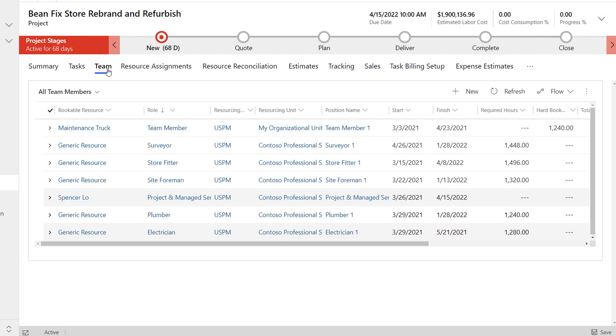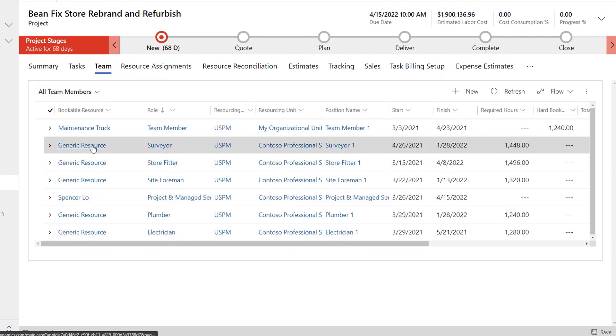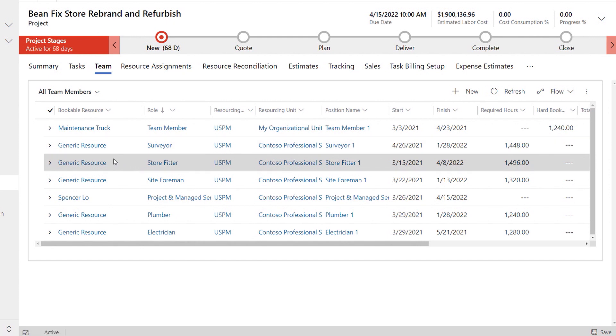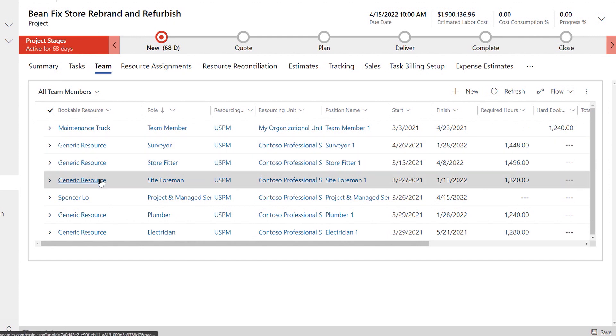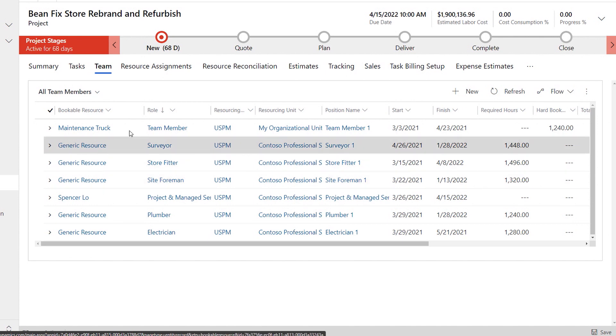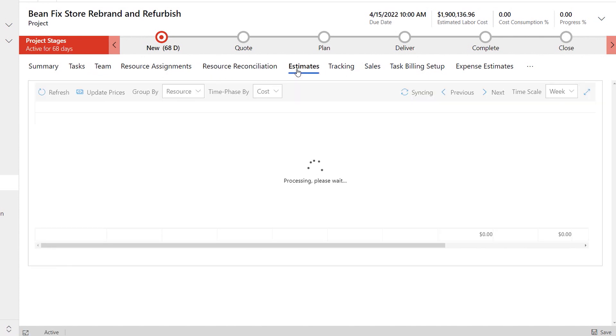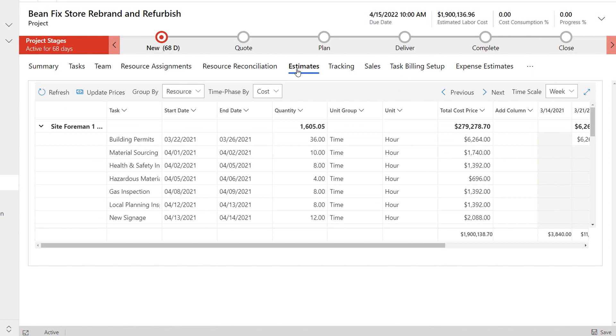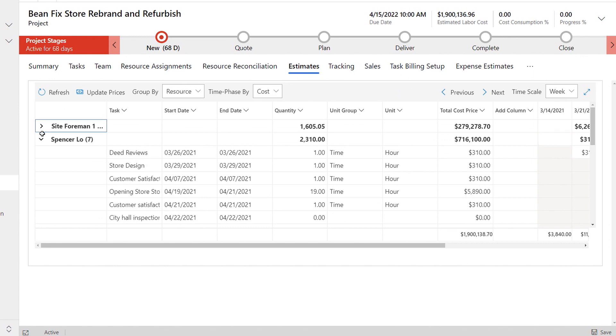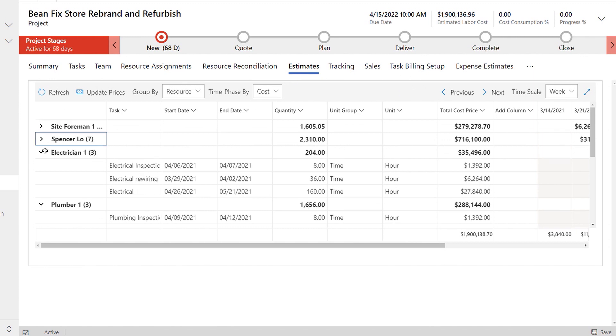and project accountants more easily manage the project lifecycle. Starting with deal management, Project Operations has robust estimation capabilities. As you can see here, the team for this project uses generic resources so project managers can create accurate estimates. Account managers can then take these estimates and link them directly to project quotes,